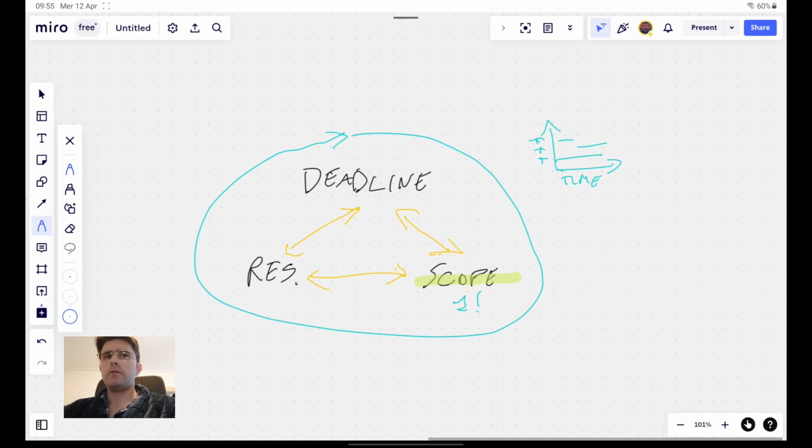Normally, we also are not strict about all these constraints. Impediments can still happen, unforeseen things can still happen, so normally we only are strict about 2 things of this trinity. For instance, if we see we cannot make a deadline, then maybe we add more people to it.